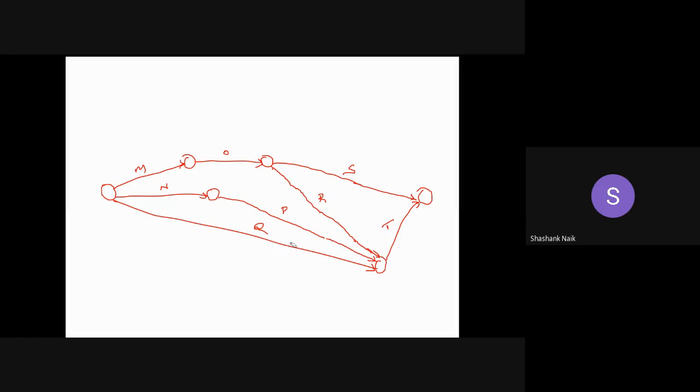Yes, dummy activities, second point. I will provide this. Thanks for reminding me. So this is the dummy activity so that it can satisfy the second condition. Here I can denote the dummy activity by a circle, and within that one more circle. This dummy activity does not carry any resources and does not carry any duration. So the duration will be 0 here. Clear?